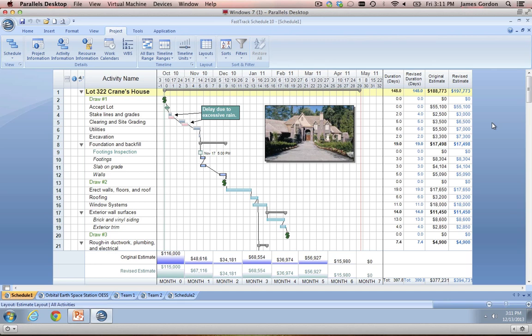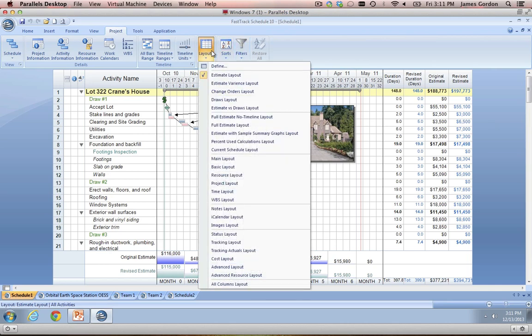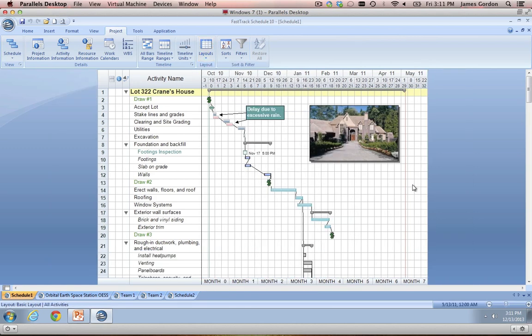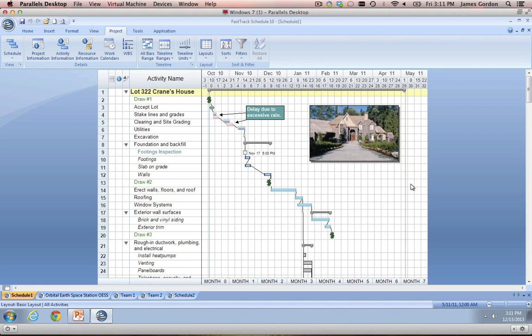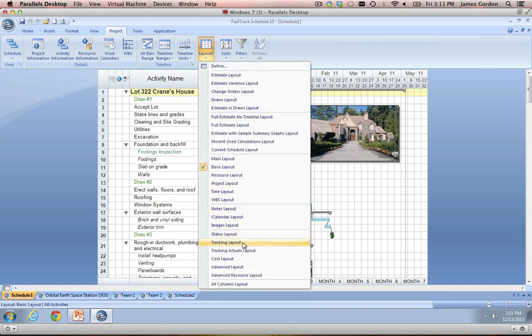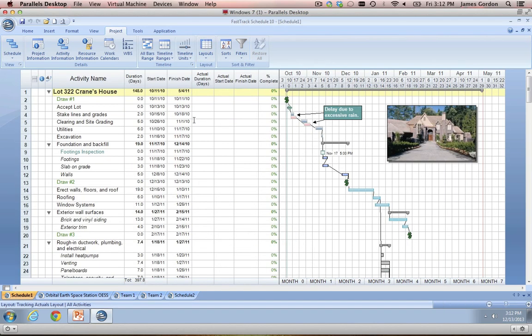The first reporting feature I'll go over is called layouts. We've worked a little bit with inserting and hiding columns in our schedule, but as you're working through different subsets of data and presenting it to others, you're going to want different groups of columns, different groups of summary graphs, and different sections of your Gantt chart to show — that's where layouts are going to come in handy. There are a bunch of layouts built directly into FastTrack Schedule. The most basic layout will just include our Activity Name column and our Gantt chart, which is really useful if you just want to show somebody a bird's eye view of the task list and timeline. Or if somebody is interested in tracking things as they go along, we can choose our Tracking Actuals layout, which will present a bunch of our actual columns that we can put information into and track progress.